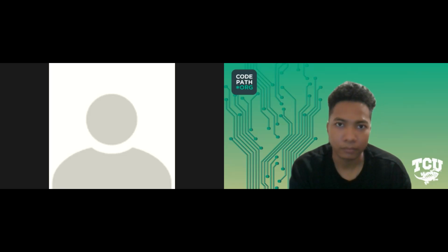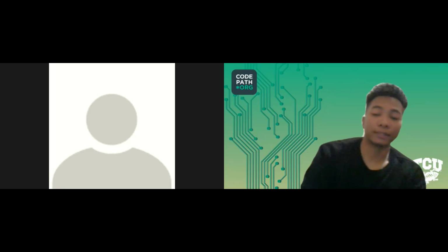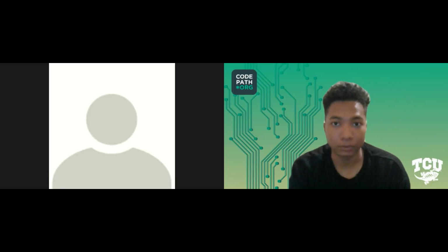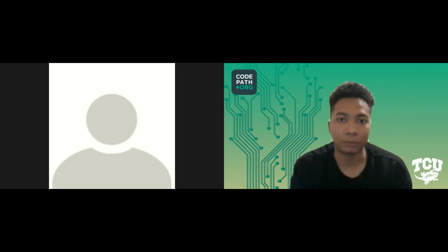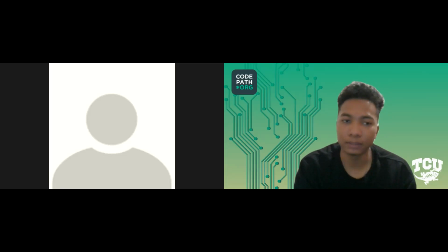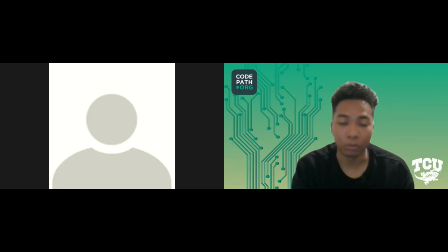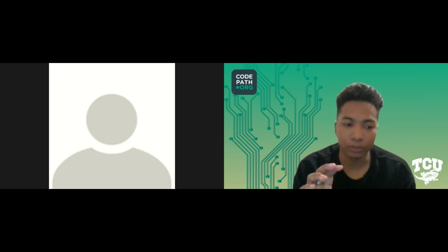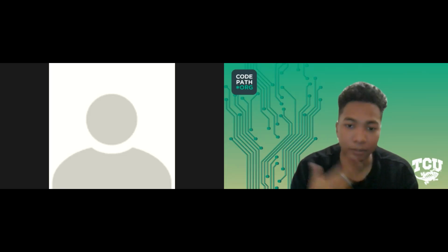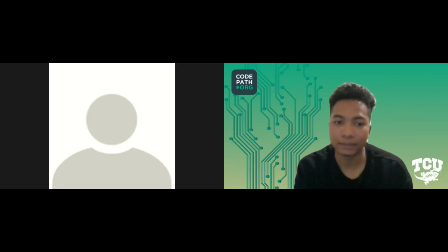We're working separately, yes. Okay. I would really suggest you try to merge your code as soon as possible. It's not a good idea to keep working separately for a long time because you might have a lot of conflicts later on. As soon as you and your team are able to meet and work together, try to figure out merging all of your code together, so that you can have your app working, figure out all the conflicts, put all the parts together, and then present. Get what I'm saying? Yeah.